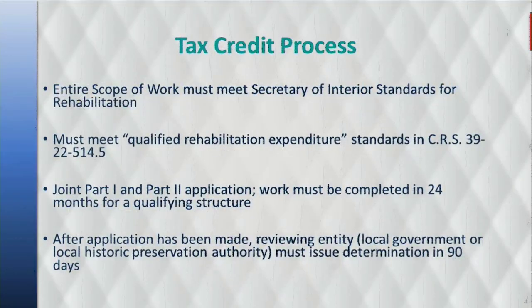And so finally, the application has been made. And the reviewing entity, which in Littleton is our local government here, that's not the case with necessarily all the CLGs across the state, but we do review them here. And the reviewing entity must make the determination whether or not the credit meets the requirements within 90 days of submittal, and those requirements have all been met.